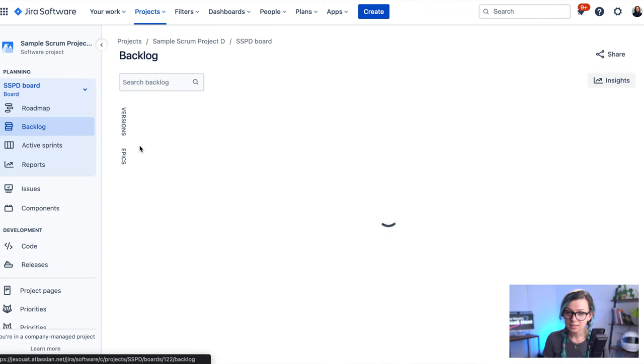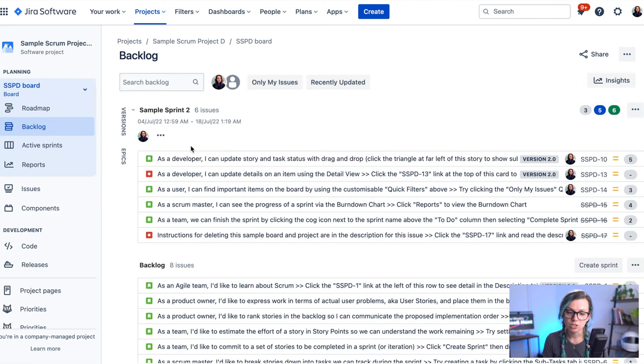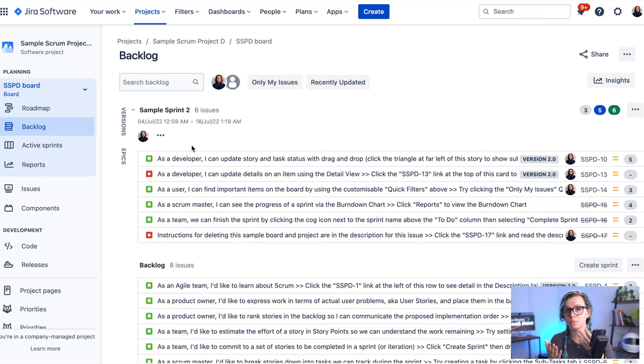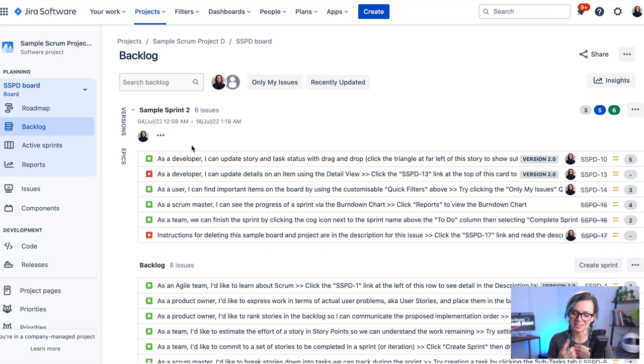One last thing that I wanted to mention is that you can create multiple sprints, but only run one sprint at a time.